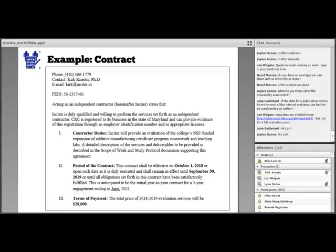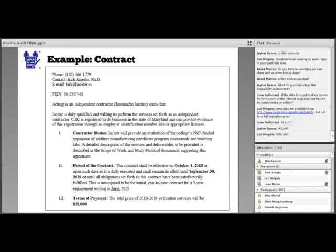Invoicing looks like it will be fine because it's fixed price. Let's see. We're still going to do all of the work planned for year one, so you're fine with that. Yeah, I think you're right. It doesn't look like we're going to have to get the contract people involved, since the timeline and the evaluation activities aren't in the actual contract. And we were clever enough to put in there that the scope could be changed without going back to the contract. So let's do this.